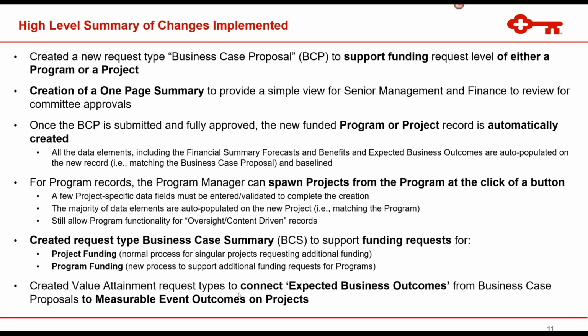For program records, the program manager can spawn projects from the funded program at the click of a button as well. So you have the top-down from the business case proposal, once approved, spawning a program, or if it's not related to a program, it can always do a project. But if it spawns a program, then you have all of that data that's pertinent brought down and populated. And then the program manager can then spawn individual projects with that same pertinent data.